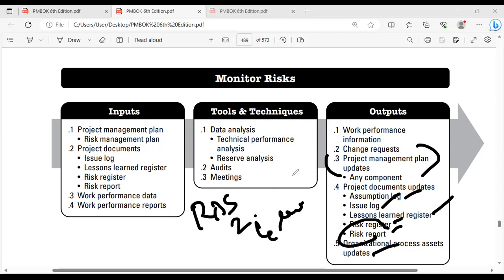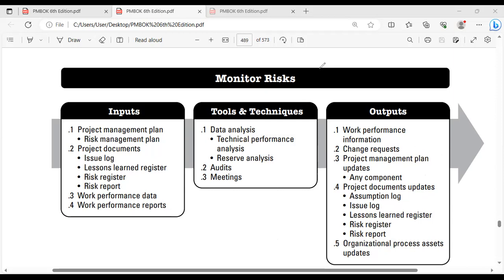Okay. So the organizational process assets are getting updated because the auditors said in their audit findings that 2 levels of RBS will not work for this kind of project. If you're going to repeat the same project in future, try to come up with a 3-level or 4-level RBS, right? So your organizational process assets are going to take note of this, and the template should be updated with the information given by the auditors, right? Anything else?